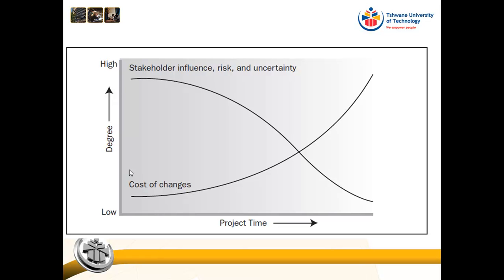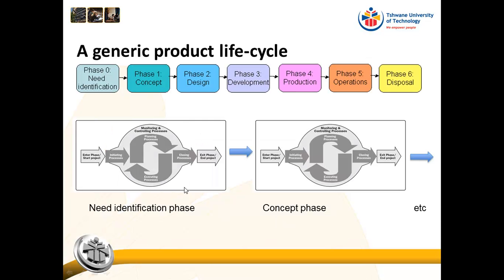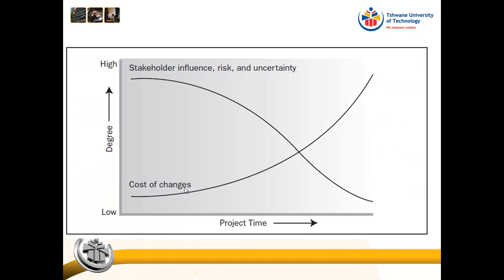Instead of that, we had all of those changes where we started out with three slats on the swing, and then we chopped the tree down, and then we installed the rope. And so all these changes, as we went along in the project, we made all of these changes, and the further we are along in the project, the more a change will cost us.